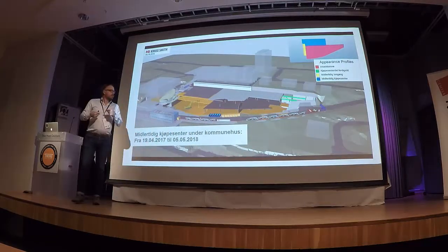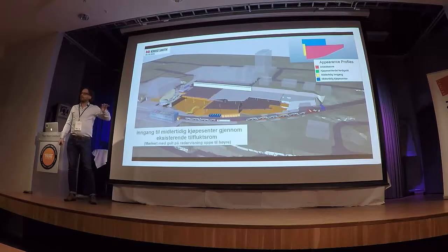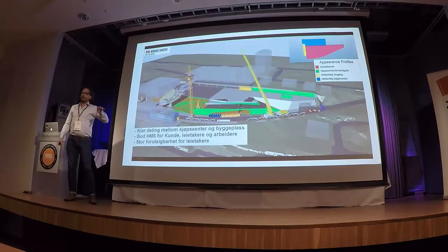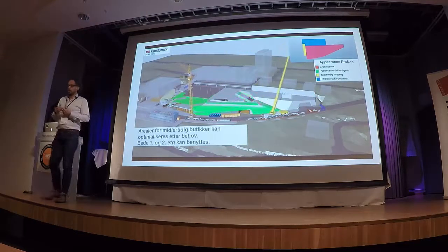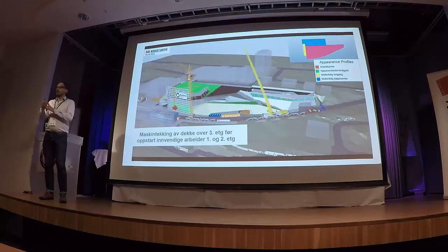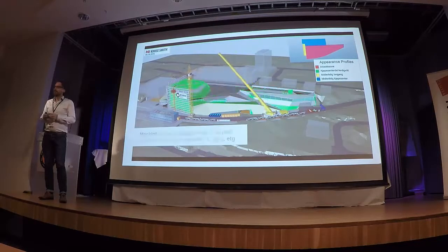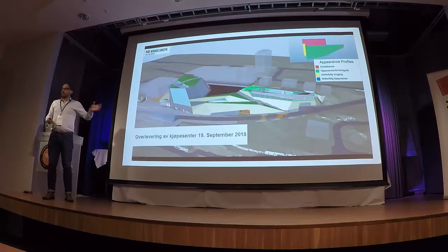But that really gave us the chance to be sure that we could do this. We worked with the client and showed them different options. We showed them an option where we closed down the mall, where we moved Vinmonopolet to another location, but ended up with a schedule that we believed in.